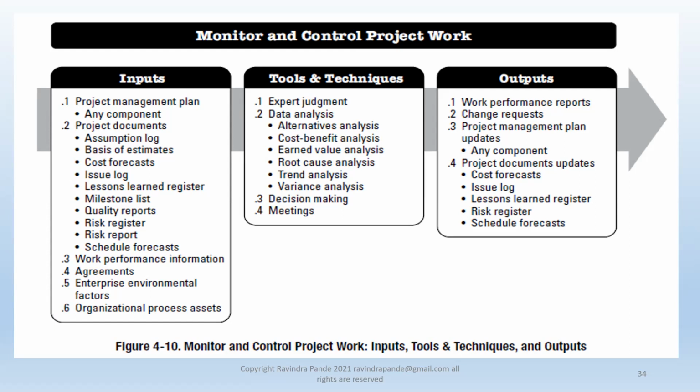When Ravindra says he'll take 24 hours to install all those 6 biometric machines and get them tested and completed, that's an estimation given by him. Now we might check with Ravindra, hey Ravindra, what's the basis of your estimate? There are a few bases of estimates we are going to learn in our project scheduling knowledge area, where the PMBOK has suggested 4 of them, and we learn an additional 2 as well. So basis of estimate is basically a scientific way of estimating how many hours or how much effort is needed for a given task.